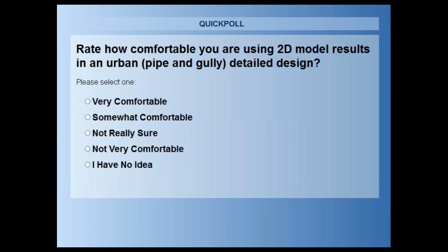So I guess while we're waiting, what's been your number one thing you think has been improved with using XP over what you used to do at Logan? I have to say, the most value we've found is in doing pre-design scoping, like preliminary designs with XP. Previously we'd get a scoping document and launch straight into design, but now we get the chance to get a better idea of what the existing problem is, if there is a problem, and see what it'll take to actually fix a stormwater issue, and then we can go back and check the cost of that. So we'll know before we start designing whether it's worth it and whether it'll hit the budget, and if we have to ask for more money before we do design. That's the biggest benefit I think we've found so far.